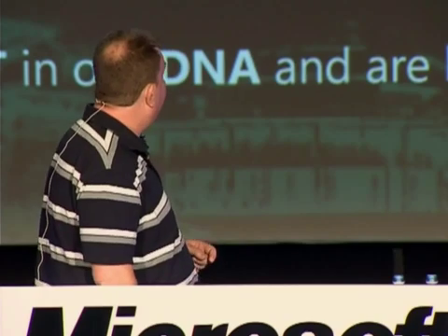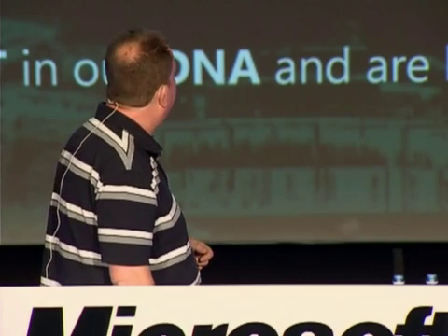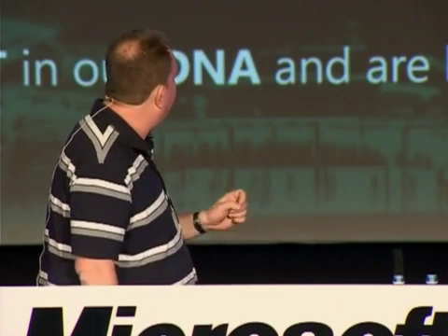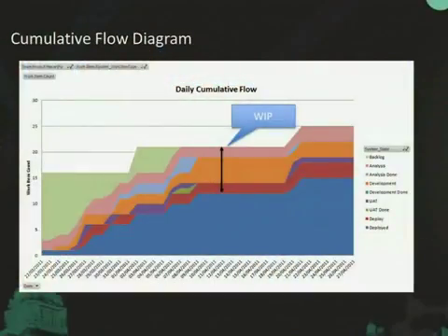We've got a lot of work in progress across the whole team. The thickness of each of those lanes shows you the amount of work in progress per activity effectively. So the orange and blue, or cyan one, is the development done. That shows you how much WIP the dev team have. So again, it's a good report for monitoring how much WIP the project's got without having to go into TFS and run queries. You could just look at this.